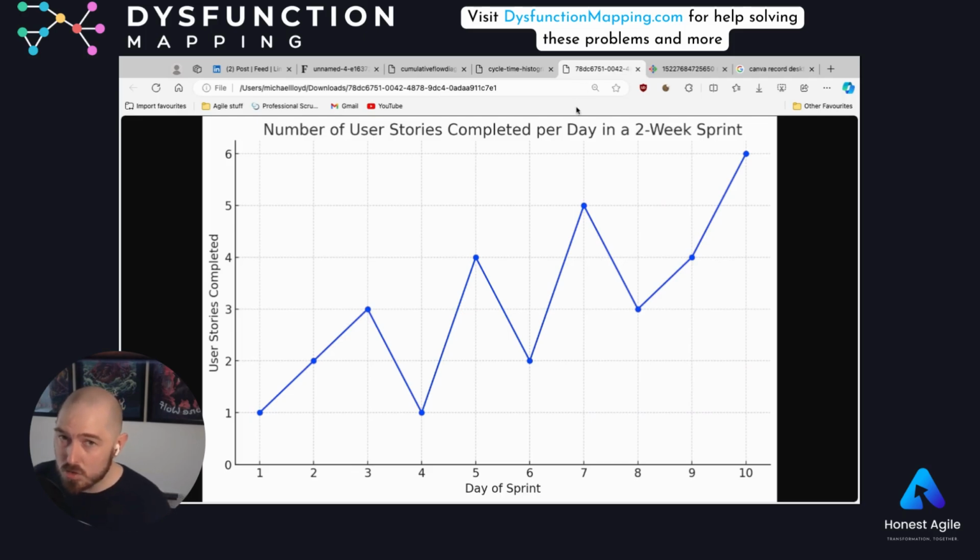I mean, this is a really interesting one because it shows that our team is actually moving work items to done, and then actually they're going backwards at several points throughout the sprint. Work items that are being marked as done, well, actually they're no longer done, and that's causing a drop in our output. And that's one place where maybe a conversation about output might be useful. But the point here is that's not necessarily the right thing.